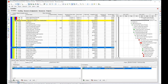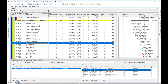You want to go through every activity and look at the set of successors and predecessors. This is a very important step but a very difficult one. We have to be conscious that multiple different successors or predecessors on each activity will create unnecessary redundancies that place constraints in the schedule. As we go through schedule updates and the software is rescheduling, these constraints will actually limit you and create unrealistic expectations for the future.